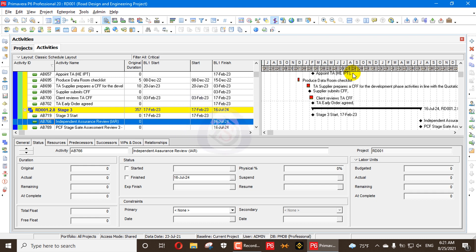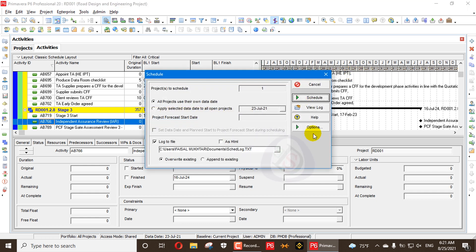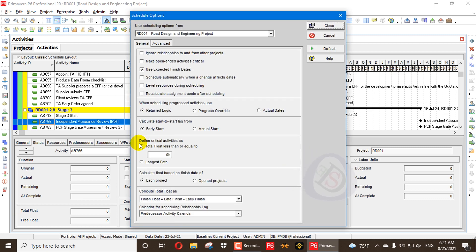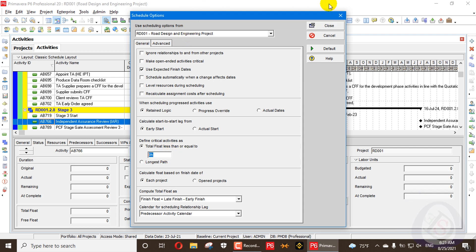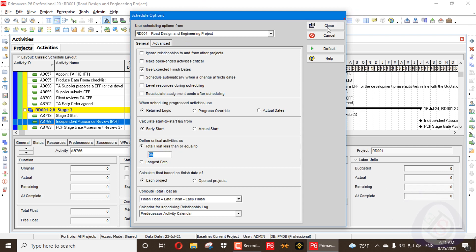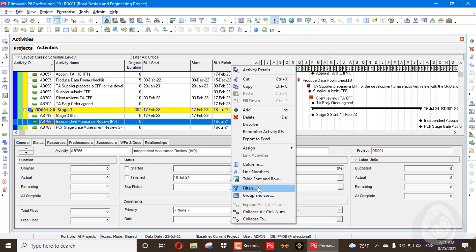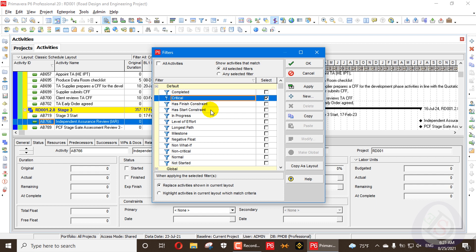So critical activities are decided when you press F9, go to options, and set total float less than or equal to zero. Here you decide the float value. When you apply this default filter, it means the activity is critical according to your schedule.